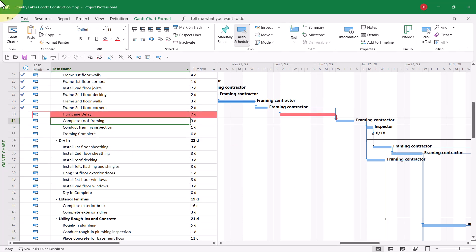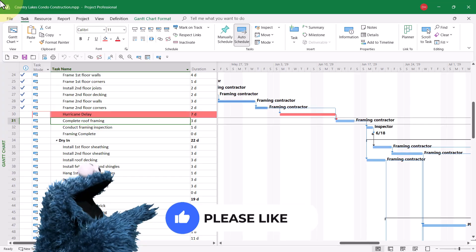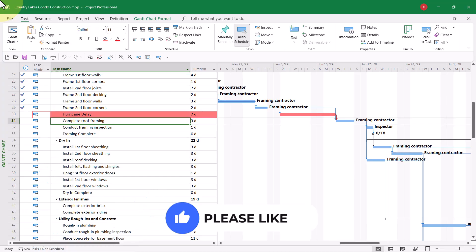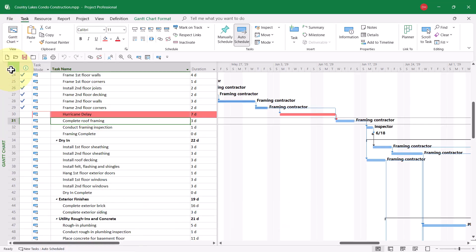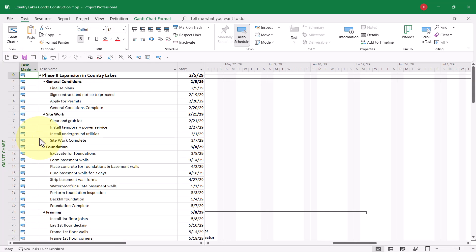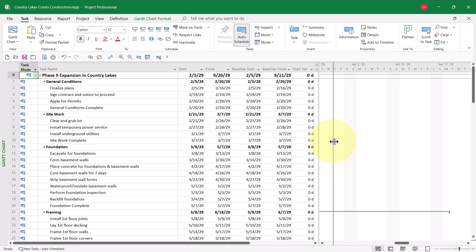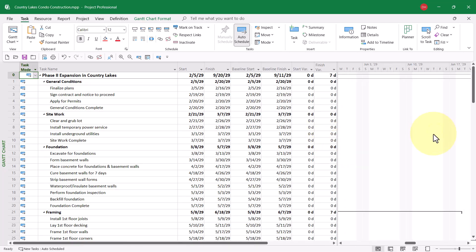After creating this delay task, I'm now ready to analyze variance to see its impact on schedule variance. To do this, all I need to do is right-click on the Select All button and choose the Variance table on the shortcut menu.